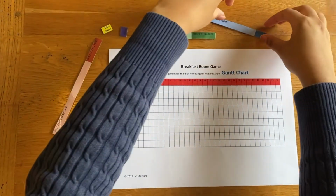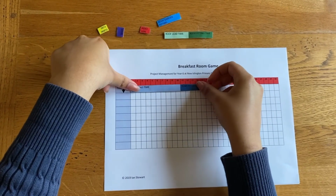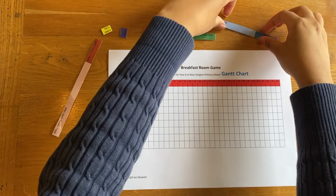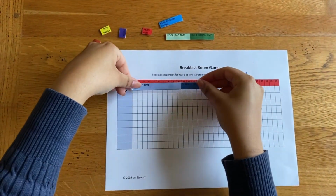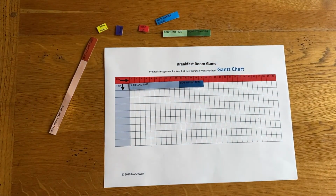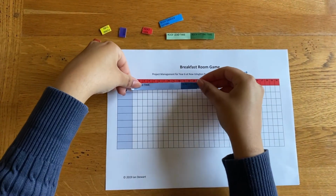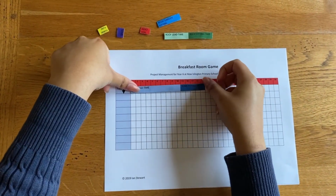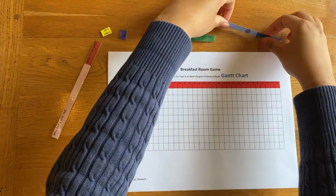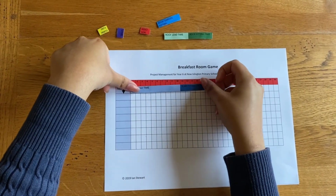With the project fully designed and costed, the project management team now needs to place procurement orders with the supplier team to ensure that the components are available at the supplier team and then can be transported to the construction team who will build the structure. The parts have to be available in the right quantity and at the right time, and delivered at the right time. So in order to work out time, the project management team now needs to develop a schedule, and they are given a Gantt chart to do this.